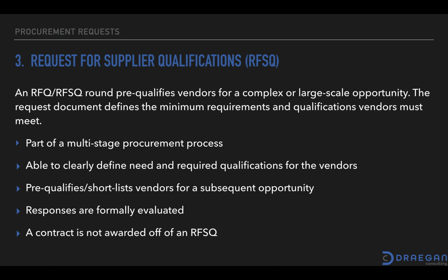Responses in an RFSQ are formally evaluated. So they are compared very diligently against some response criteria, and providers are ranked. So there's a minimum threshold they need to meet. If they do meet it, they can continue and they may bid on the subsequent round. If they don't meet the threshold, then they are not allowed to continue.